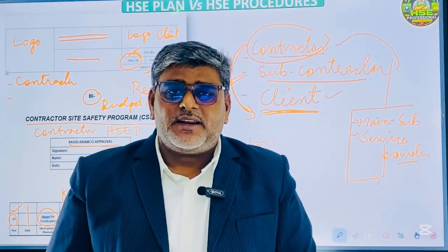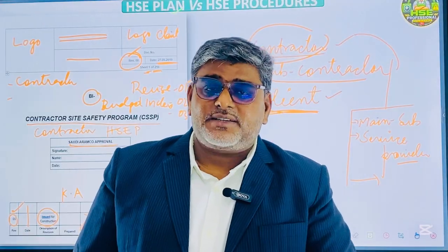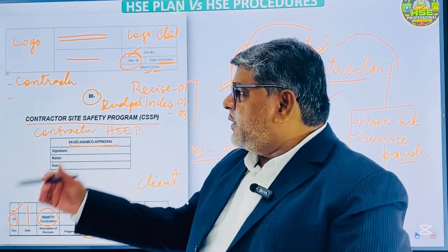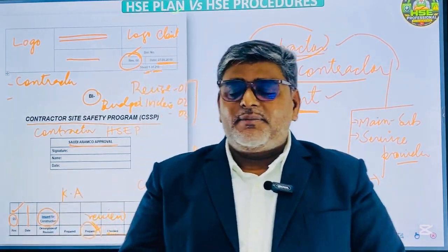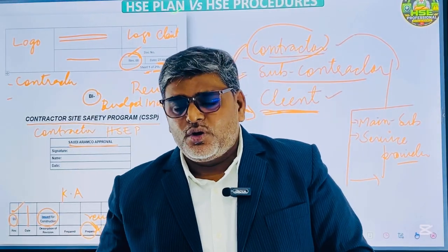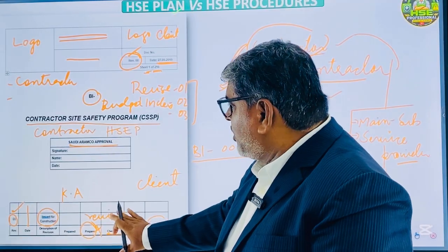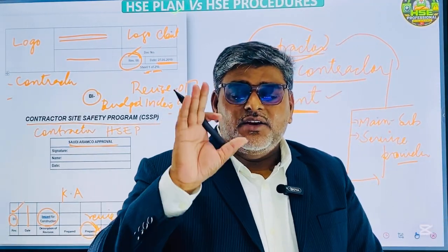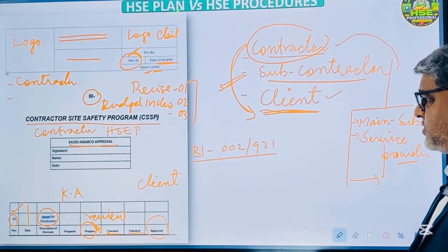It is not clearly mentioned anywhere, but being a safety professional, because this is a manual, this is a plan, it needs to be developed by the safety department, and it will go to the project manager or senior management, my corporate manager, to review these documents, and later on that will be sent to the client for review. The client will do benchmarking to review these documents.